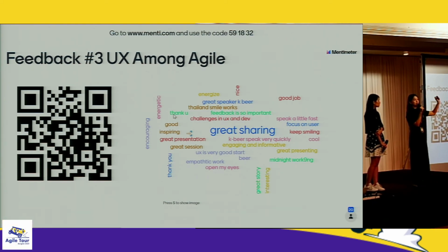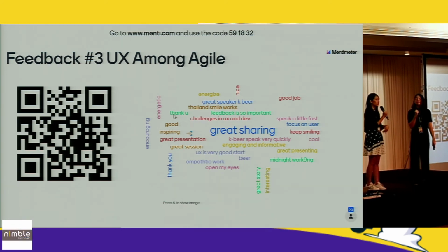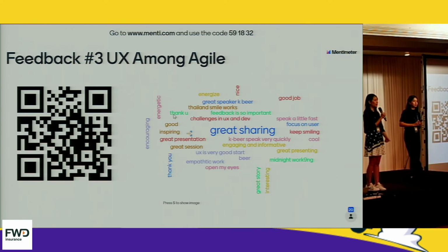Another important thing is that when we do the prioritization, it's not only the user and the product owner from the business team, we also need to engage the developers for the development effort too, so that we have many aspects to help evaluate whether this priority is suitable and has more value or not.